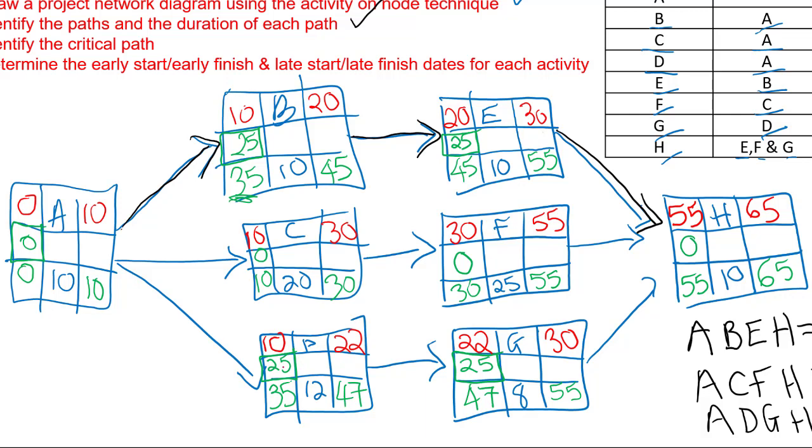We have 25 days or weeks of time up our sleeve, and we can organize our scheduling as we see fit. We might not want to start those activities all on that same day. On day 10, we could spread our resources about and make some decisions.